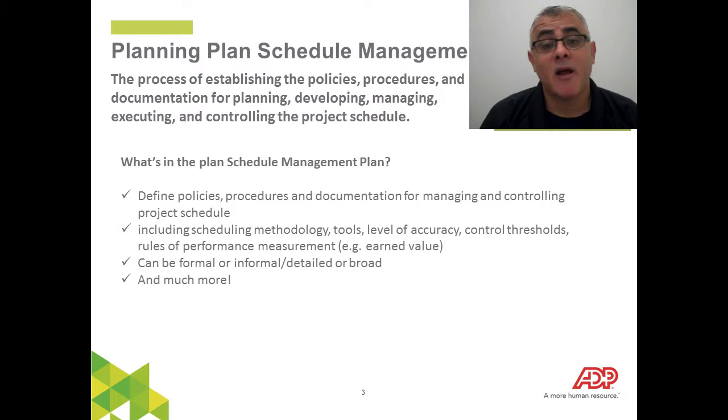Okay, so let's jump right on into our first process in the planning process group. So for project time management, our first process is to plan schedule management. You've already become familiar with some of the other knowledge areas and their first process. Usually that's planning how you're going to handle that particular knowledge area. So it's no different with schedule management. Here you're going to document the policies, the procedures, the methodology or approach to handling the schedule.